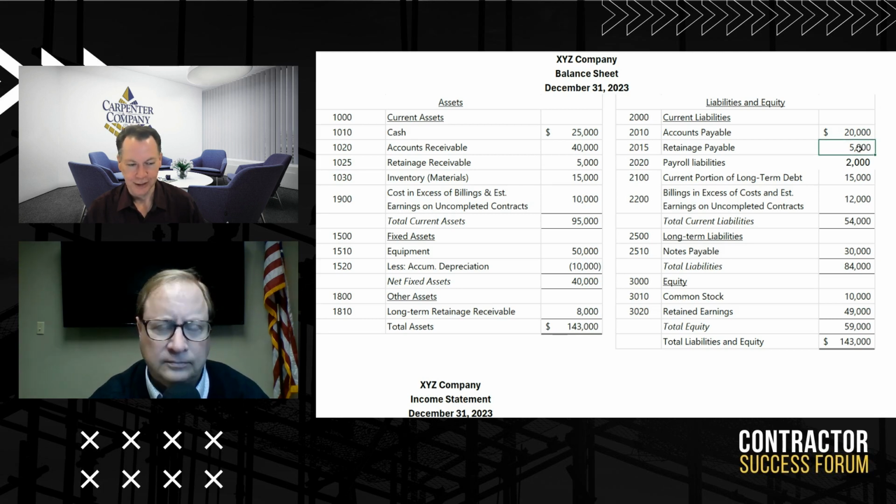Absolutely. This usually goes hand in hand with a conversation about a cost code structure. I've said this many times, a contractor that has no job costing, as long as we can at least get them in the main categories and get it actually costed to a job, that's a huge leap forward. But having the cost code structure means, hey, if you're demo or concrete or electrical, plumbing, whatever the things are, you could be subbing out parts of those things, or you could have materials for plumbing or electrical. And so there's a cost code where we're slicing and dicing our costs different ways so we can see on a line by line basis how we're doing, how we're billing it. If you're using AIA billing, you probably have to do the schedule of values and put a lot of that detail. And all this marries up to this structure that we're trying to build.